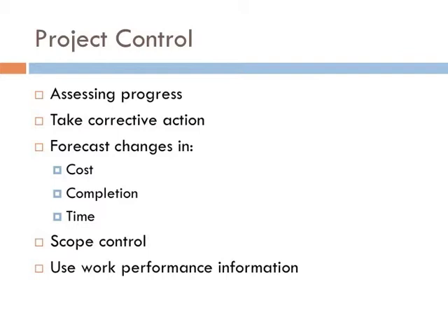If acceptable to the project manager, a change to the scope should be formally verified, for example, through authorization by the customer sponsor. A common problem is that the customer tends to frequently demand changes to the work required. The problem of uncontrolled changes to the project scope is called scope creep. To control a project's cost and schedule, various measures are used. Work performance information includes the completed and uncompleted deliverables, ongoing and completed activities, percentage of each activity completed, costs authorized and incurred, cost estimates to project completion time, and so on.